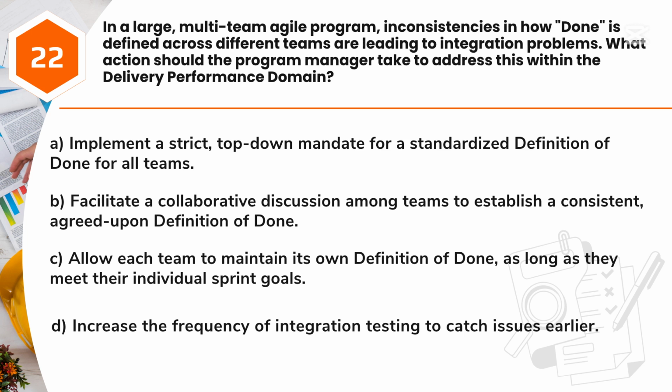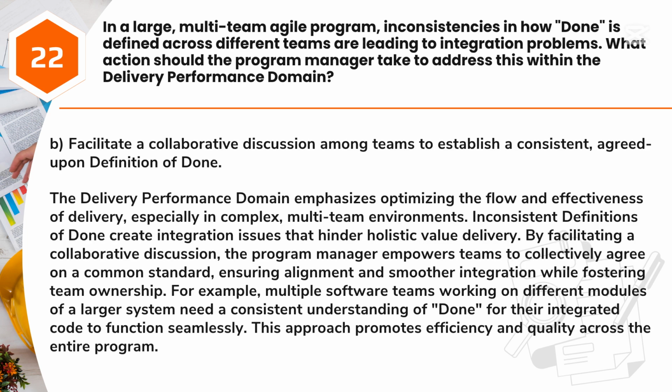Answer: B. Facilitate a collaborative discussion among teams to establish a consistent, agreed-upon definition of done. The delivery performance domain emphasizes optimizing the flow and effectiveness of delivery, especially in complex, multi-team environments. Inconsistent definitions of done create integration issues that hinder holistic value delivery. By facilitating a collaborative discussion, the program manager empowers teams to collectively agree on a common standard, ensuring alignment and smoother integration while fostering team ownership.